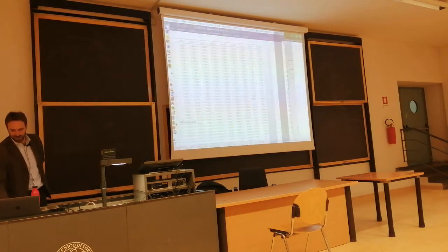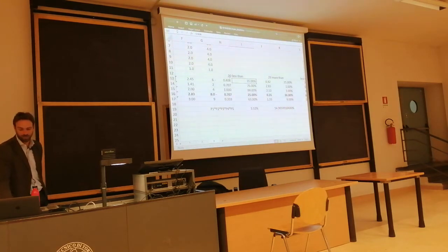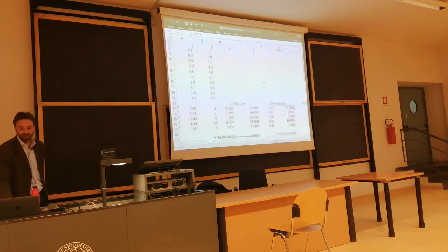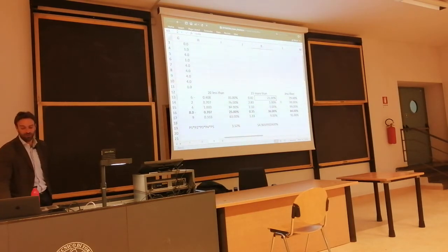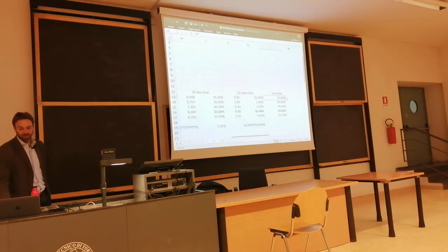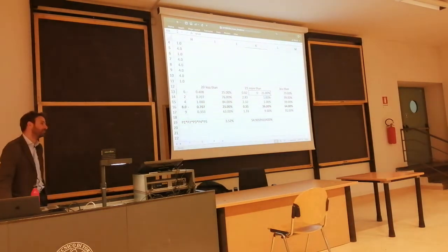So here we do have 35% chances to finish before 20, but then we raise to 21% only, because the Z value goes to 0.82 if we want to have a desired duration longer than 23. So we get 21% chances to finish with a longer project than 23. So chances that we finish before 23 goes to 79%, which is 100% less 21.